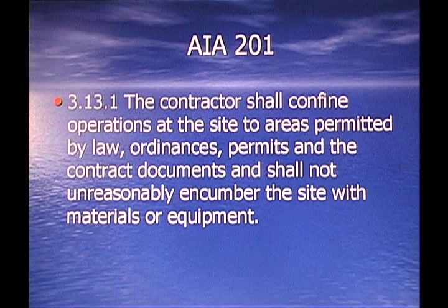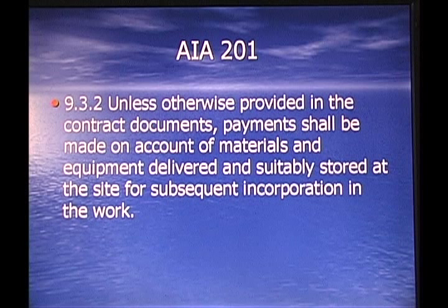3.13.1, the contractor shall confine operations at the site to areas permitted by law, ordinances, permits, and the contract documents, and shall not unnecessarily encumber the site with materials or equipment. 9.3.2, unless otherwise provided in the contract documents, payment shall be made on account of materials and equipment delivered and suitably stored at the site for the subsequent incorporation into the work.